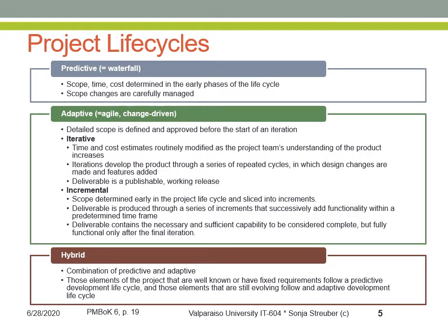So what's the big difference between an agile project environment and a waterfall environment? Well, in a waterfall environment, we have to be absolutely sure about what we're building. That's why we have, in this course, spent quite a bit of time on scope definition and scope documentation, and we know that in a traditional environment, scope does not change until you collect all the information and file a change request with the project sponsor. This project sponsor then has to approve the change request to adjust schedule and budget to expand or contract as scope gets bigger or smaller. That's what we call the predictive lifecycle model, or the waterfall lifecycle.